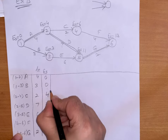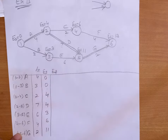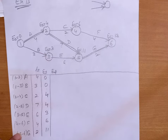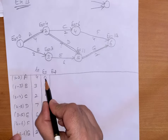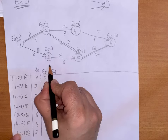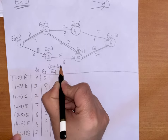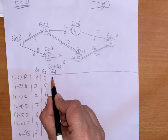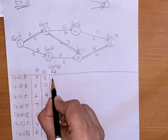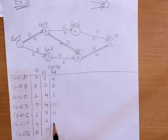Now we are to find out earliest finish time in the table. The formula is: earliest finish time equals earliest start time plus expected time. So the values are: 4, 3, 6, 11, 9, 10, 13.